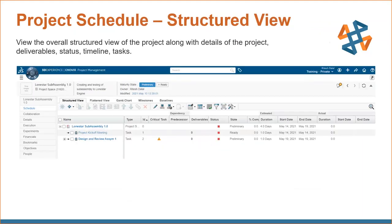The structured view is the most common view for project management. Here you can see your top-level project — for example, 'Lone Star Sub Assembly 1.0' — and start creating separate tasks associated with it. You can add as many tasks as needed, set deliverables, duration, start date, end date, and see the entire project with all associated tasks and deliverables in one view.